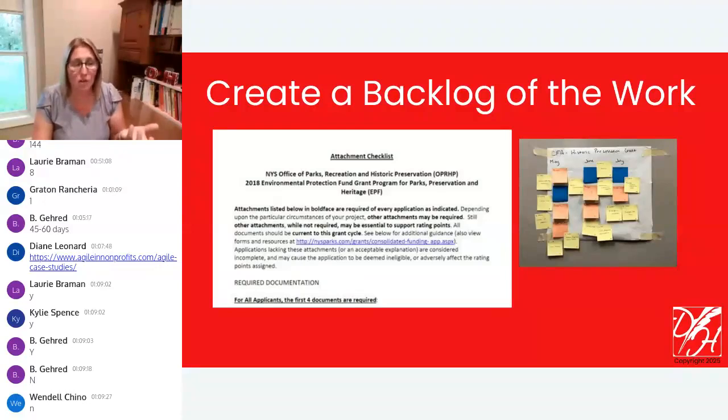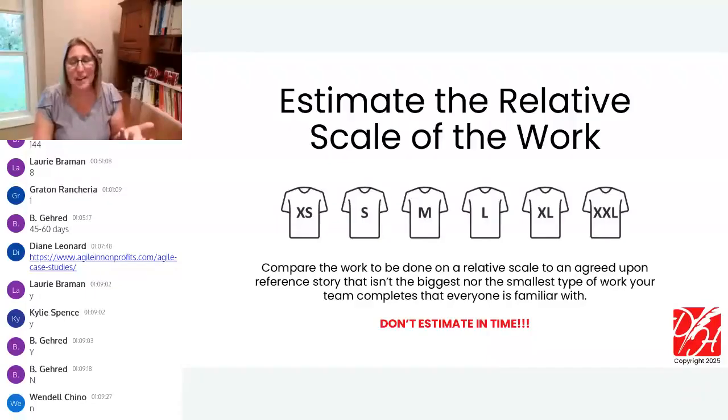But now, well, we've broken it down so that everything feels a little bit smaller. Now everything on the board is more a traditional medium for us, something more like that letter of inquiry. When you sum them all together, they are a huge application, but now we can see the bite-sized chunks that we're going to work on to make progress towards that big goal.